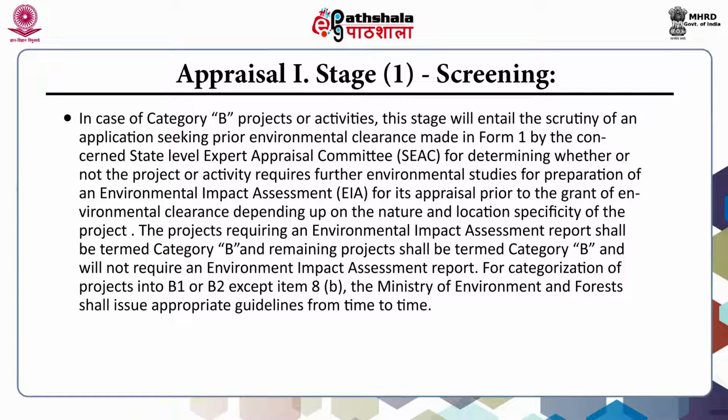This stage will entail the scrutiny of an application seeking prior environmental clearance made in Form 1 by the concerned state level expert appraisal committee for determining whether or not the project or activity requires further environmental studies for preparation of an environment impact assessment for its appraisal prior to the grant of environmental clearance, depending on the nature and location specificity of the projects.